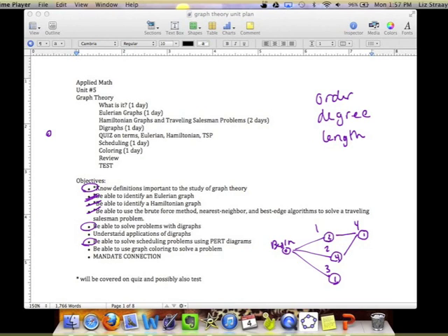Then you should be able to make the schedule. Okay, the schedule is where you would say, in our week, what tasks are we doing? So in week 1, I can start anything that does not have a prerequisite. So in this little partial PERT diagram, in week 1, I could start tasks 1, 2, and 3 because none of them depend on anything else being done.